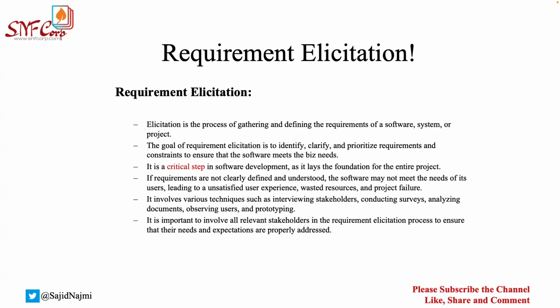If you have good experience, you can do that. That all depends upon your experience and the nature of the project. But I would always recommend people, you should not focus on how, when, and where it can be delivered during requirement gathering. This might make your life a little complicated. So try to have them in 2 different places. Number one, focus on what is needed, why it is needed. And when you're actually doing analysis and elicitation, you can ask, okay, now how can we deliver? What are the different constraints and challenges that we have, when and where this can be delivered based on all that research.